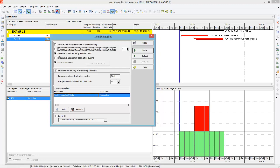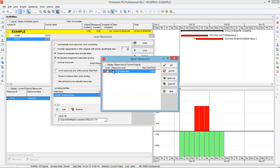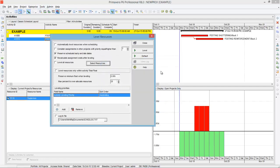A very necessary option is preserve schedule early and late dates. Another is recalculate assignment cost after leveling — after leveling, if there is any change in cost, the program recalculates it automatically, so you can check this. There is also an option to level all resources: if checked, it will level every single resource assigned to the project. If you uncheck it and press select resource, you can choose which specific resource to level.